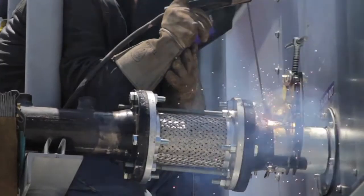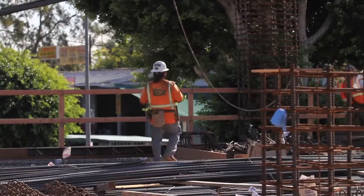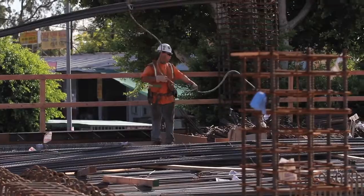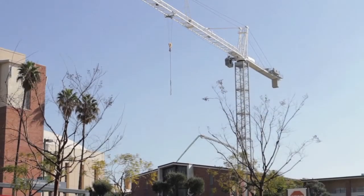As many know, working in a dense urban environment creates significant challenges for delivery of materials. I mean, we're working on a 0-lot line project. Shutting down a street is a significant challenge for deliveries. We did have to, on this somewhat short building, a 6-story building, install a tower crane.